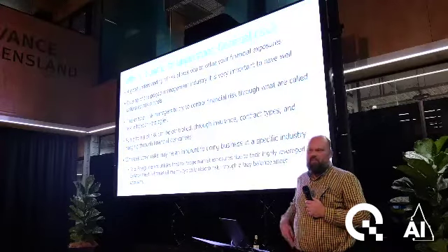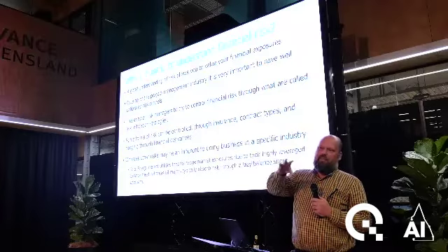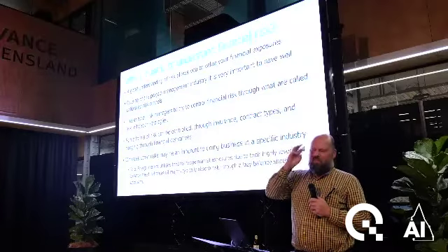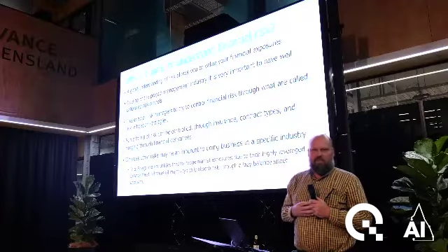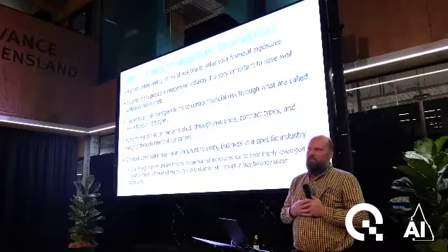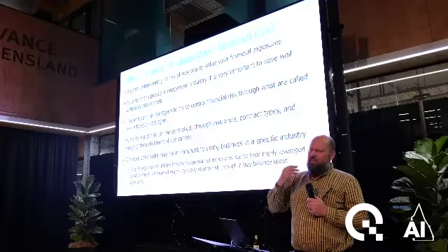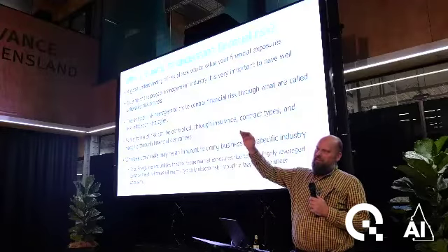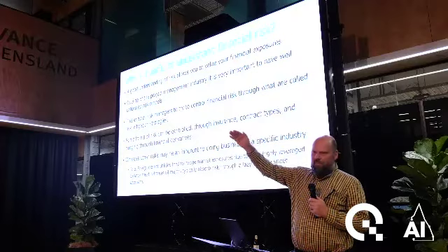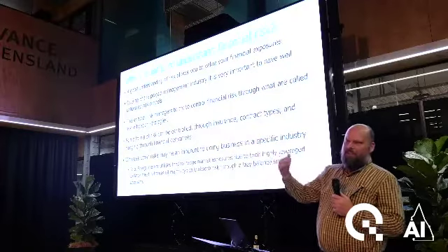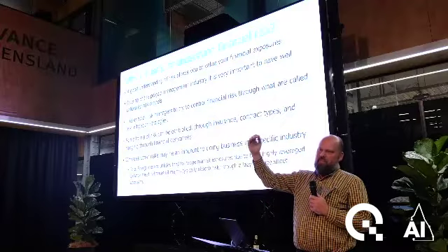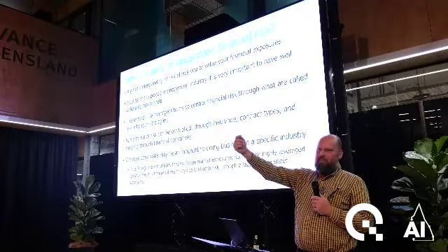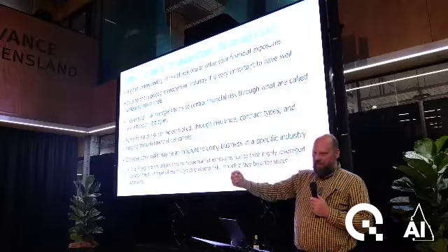You'd have this Monte Carlo simulation, and you'd calibrate your stochastic model to historical parameters, or some other model that you use to produce those parameters. Then you run this model and find where your P50 was, and you'd say, okay, that's my expected. Then you'd go down to the P5, where you're going to make a loss, and you'd actually report the difference.